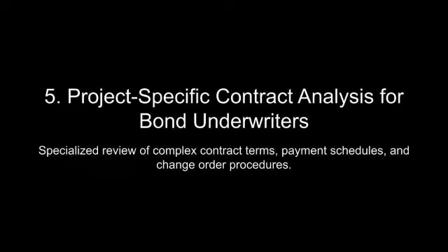For example, contracts that mandate arbitration should clearly define the rules and procedures governing the process, including the selection of arbitrators, the scope of discovery, and the timeline for issuing a final award. Similarly, mediation clauses should specify the qualifications and selection process for mediators, as well as the steps to be taken if mediation fails to produce a settlement.